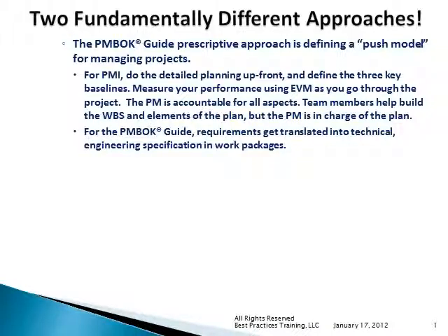So, in conclusion, in summary, I think there really are two different models for project management that are being proposed. And I think the classic PMI model, the PMBOK model, is much more of a push model, if you will, a prescriptive model. We need this type of model in a number of cases where we need to plan everything in detail up front. We can't afford any mistakes. We've got to get it right the first time, or we're in a fixed price contract or with very tight constraints that cannot change. So we know what our requirements must be in detail.